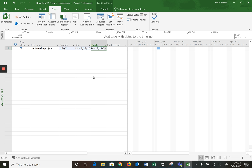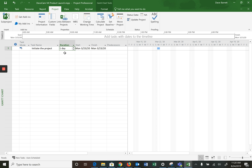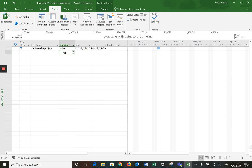What you should do is update the duration. It just happens to be one day, but don't leave the question mark — that looks odd. You can go up and then down to get rid of it, or just type a one in there. Days are the assumed duration type. Press Enter. So now we've got a one-day duration activity.